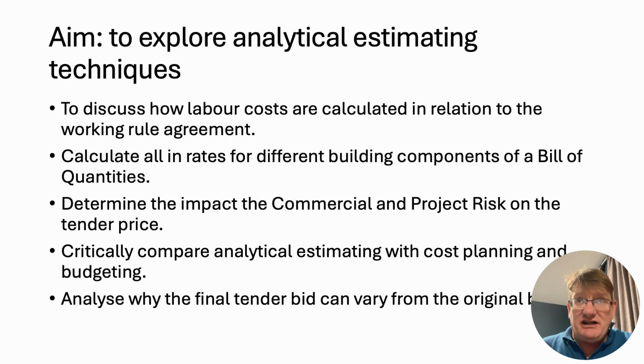So for instance, the Chartered Institute of Building, in their guidance for project managers on producing a tender, recommend that the estimator, the planning engineer and the site manager that's been selected go out on site at least once before they produce the estimate. Usually, obviously, you've got to ask permission from the client, so they can give them the scope of the site.